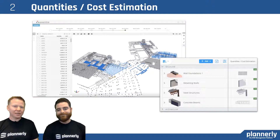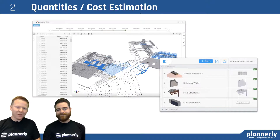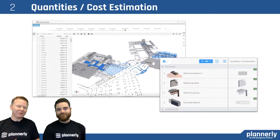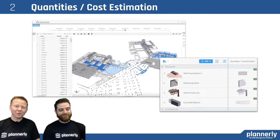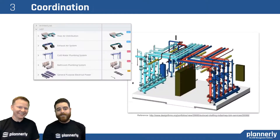And then for quantities and cost estimation — knowing what we're going to take off from the model, making sure that the concrete is complete, and making sure that we are very certain about the elements needed before we go and try to take off quantities is really important, because missing quantities is going to be a problem for the cost.